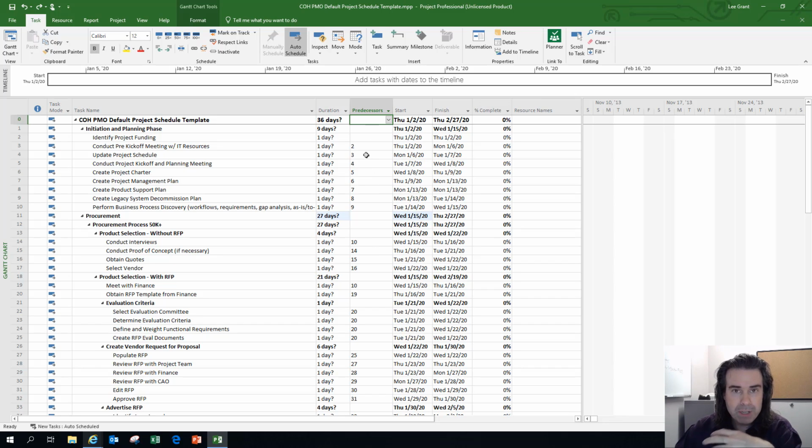This is the best practice that I found. Is task number 1 a real task? No, it's not. It's in bold. It's therefore a summary task. We're not going to put linkages together that involve summary tasks.